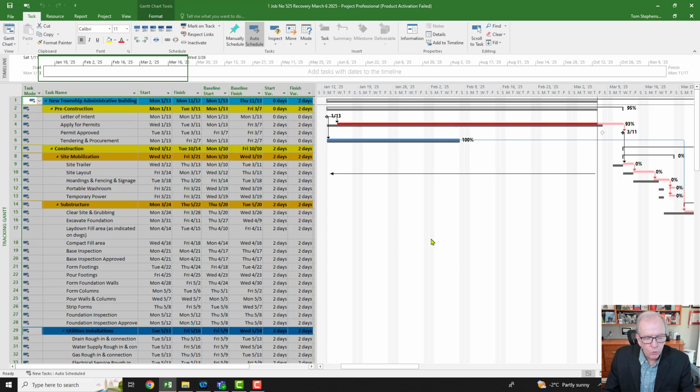So at this point now, I'm going to perform a recovery. That was the update. This is what I want to be clear on, because this is where I'm having some issues with some of my students. There's like, well, what's the difference between the update and recovery? Well, the update was historical. This is what's done.